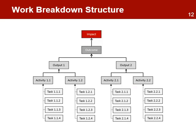The main activities identified throughout the log frame analysis are a summary of what the project must do in order to deliver project results. The WBS is a results-oriented hierarchy decomposition of the project work — a technique to break the activities into manageable tasks. The breakdown allows for tasks that have sufficient detail to estimate their time and the resources required. Each task can then be assigned to an individual responsible for doing the actual work. The WBS is usually represented in a graphical chart that identifies all the work required to deliver an output.